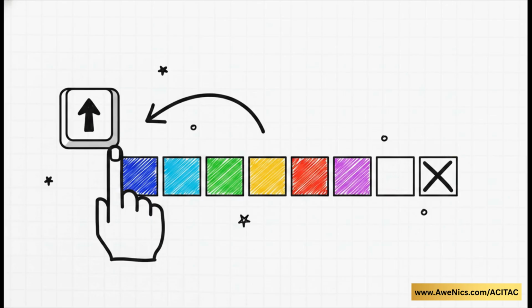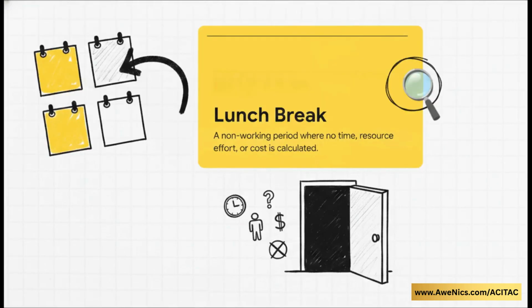Now watch out here. If you just click Monday and change the hours, it literally only changes Monday. To set up a 6-day week the smart way, hold down the Shift key on your keyboard, click Monday, and then click Saturday. Boom, all 6 days highlighted at once. Just be super careful not to select Sunday, assuming Sunday is your designated day off. With your days highlighted, choose the third option down. Set days to these specific working times.